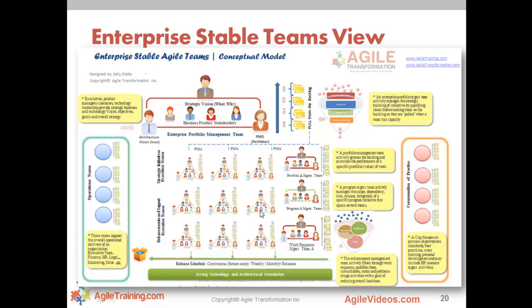Another question that I get about stable teams is, are they really stable? And how do you keep them stable? They're stable as much as possible, let's put it that way. If this team pulls a big deliverable, a large, let's say, theme, and they realize, man, we need an expert in XYZ and that's not part of our team, then a little bit of tweaking may happen to this team based on this new deliverable. An additional analyst might come in and help. They might actually come in and pair with someone else to do knowledge transfer so this team knows how to do that in the future.